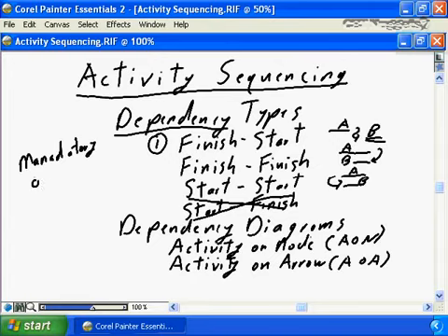Often people will put optional dependencies into the project plan as well, simply saying, although it's not critical that A finishes before B, it would be ideal, or it would make more sense, or maybe B is being completed by the same resource as A, so therefore B shouldn't be started until A has completed that. Avoid, where possible, putting optional dependencies into your project plan.